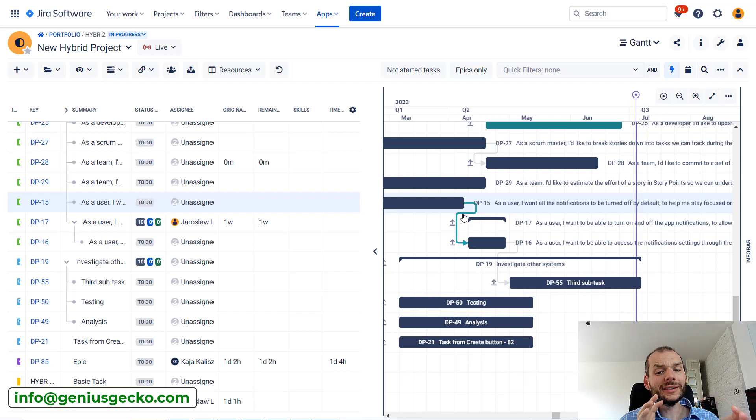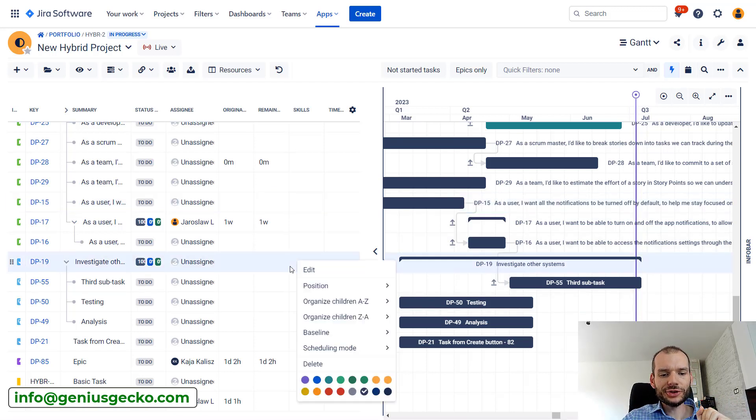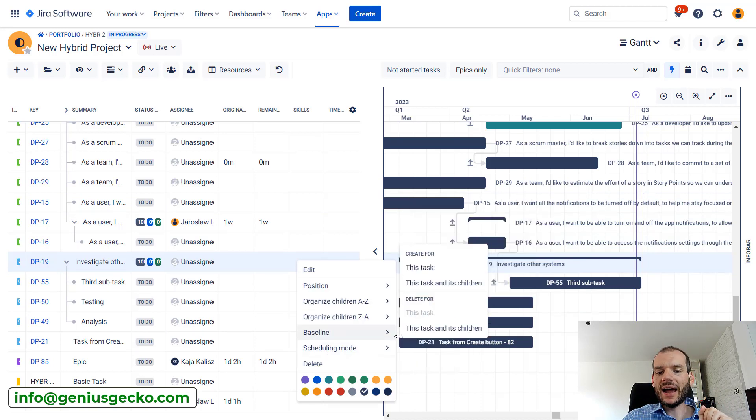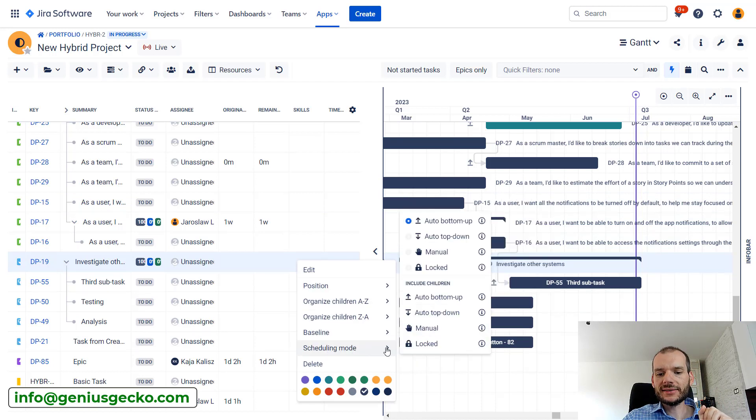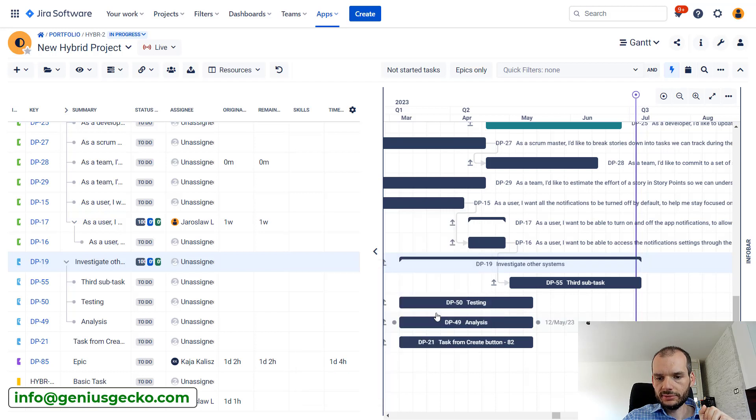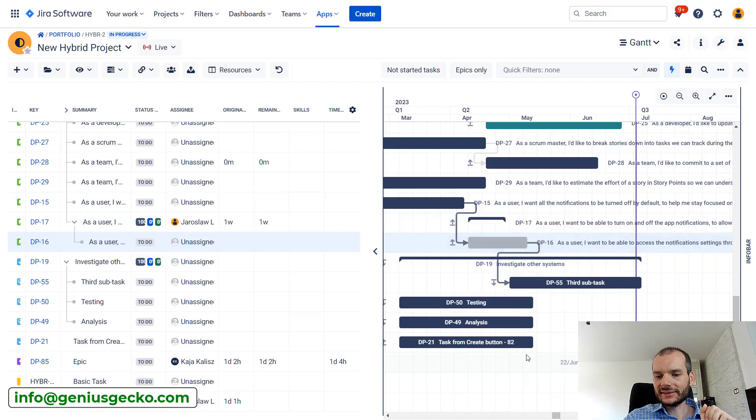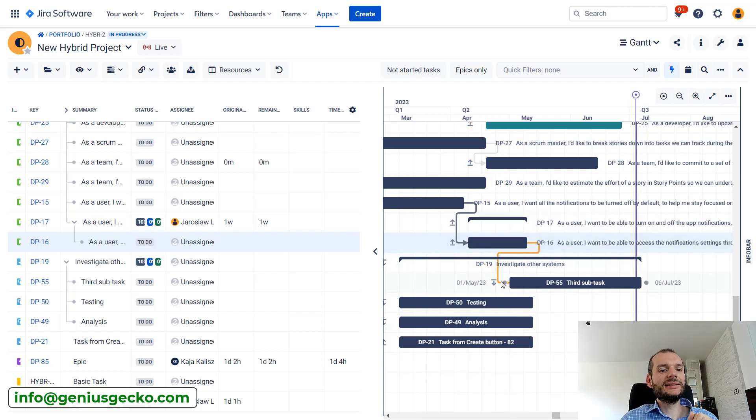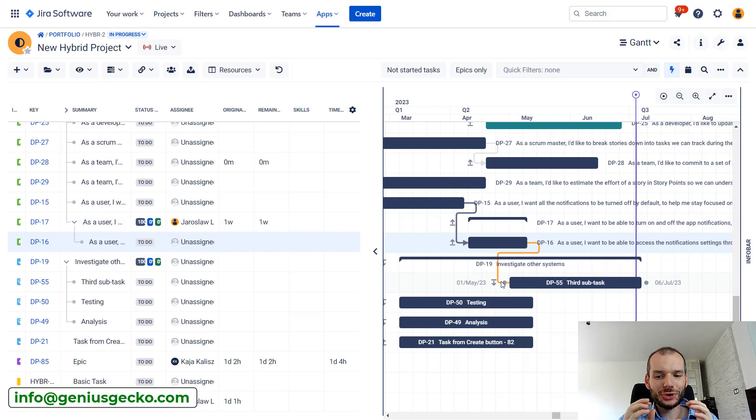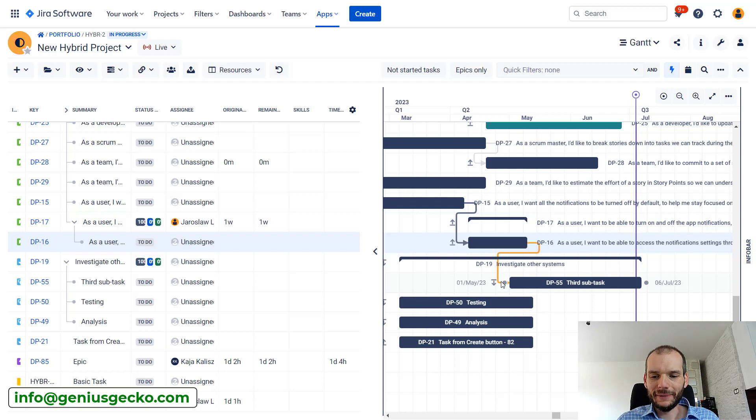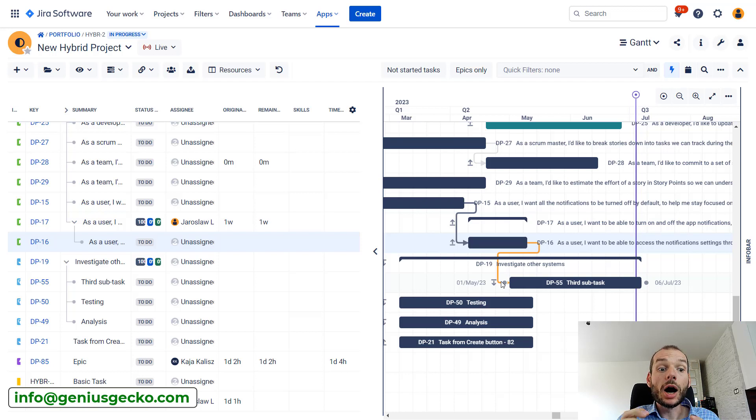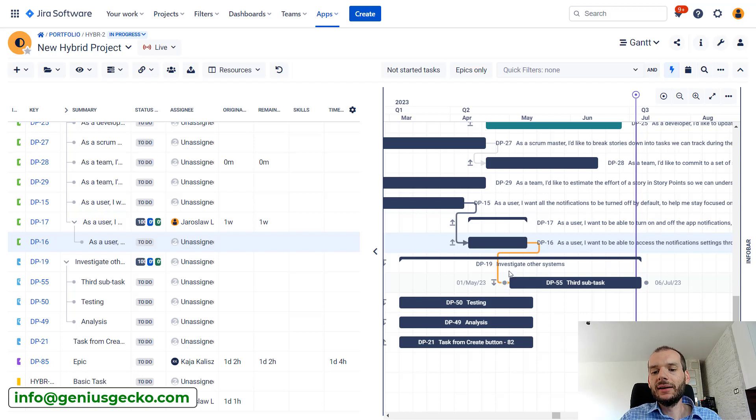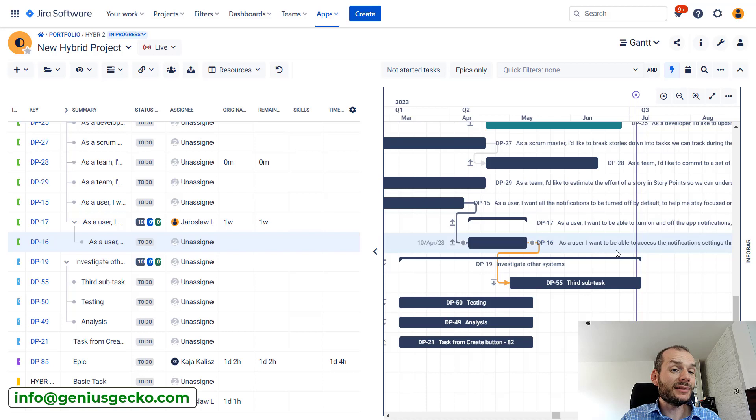The dependencies highlighted in blue are one thing. Now you will also see dependencies that are highlighted in kind of a yellowish color. Let's actually try to force Big Picture to do that. I will change scheduling mode to auto top down, and I will delay the end date of this task. Now you will see that this dependency is highlighted yellow, and this is something that you should be looking out for very carefully, because this basically means that our plan might not be feasible.